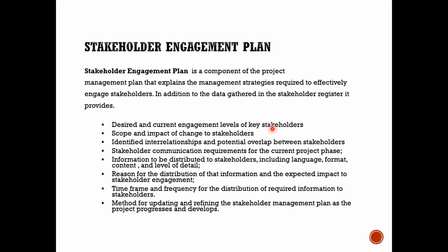stakeholders. In the stakeholder engagement plan, we also have information about the scope and impact of the change to stakeholders. See, the impact of a change to different stakeholders will be different or not? Yes. Sometimes the impact can be big, sometimes the impact can be small. Can an impact be losing a job sometimes? Yes. Can the impact be relocation sometimes? Yes. So there can be multiple impacts. Third, identified interrelationships and potential overlap between the stakeholders. Stakeholders can have overlapping needs also,